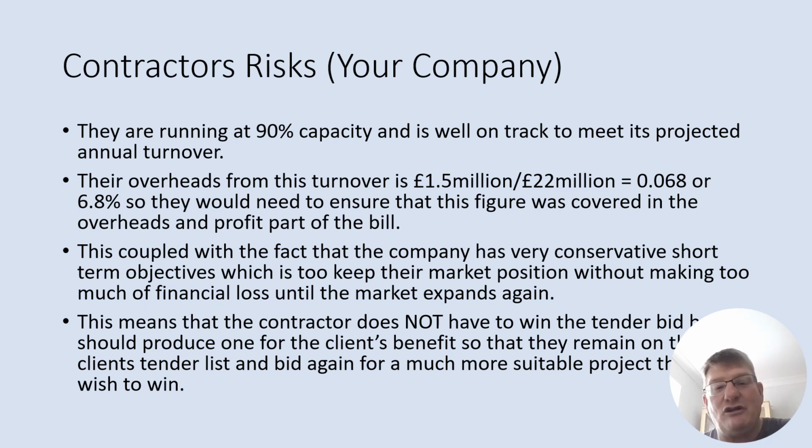So this means that the contract does not have to win the tender bid, but you should still produce one to keep the client happy, to stay on the client's list. Remember to say that. Okay, don't forget to say that. That's really important.